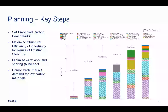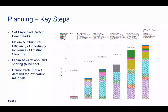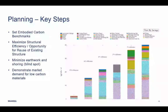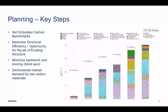Personally, I think tracking embodied carbon similarly to how we track cost per square foot is really powerful — tracking it as kilograms of CO₂ equivalent per square foot. That's my favorite benchmark. You start at a certain CO₂ per square foot, then set goals around how much you want to reduce that as you go through design and construction. A few key strategies: the most intuitive one is obviously to maximize your structural system efficiency. There's no better embodied carbon strategy than simply minimizing the amount of material in your building.